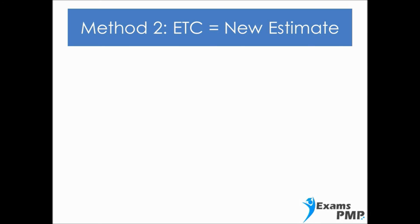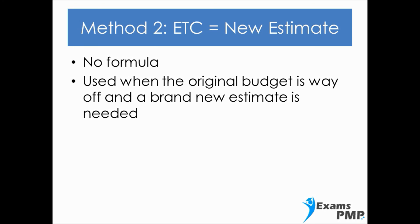The second method of calculating ETC does not require a formula. If you know the original budget is way off, you need to conduct a brand new estimate to calculate the ETC.